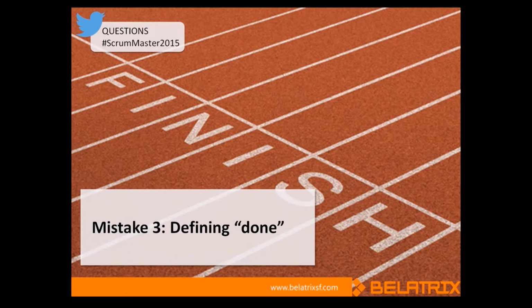In this case, for customers, the definition of done could mean having all the sprint's features deployed in prod. However, for the dev team, done could mean having all features ready for test, right? So everybody has to keep in mind that the definition of done must be defined at the beginning of each sprint. We have to make sure that everybody, I mean the customer, the teams, QA, dev, understands what done will mean for that sprint.